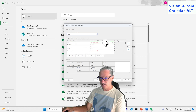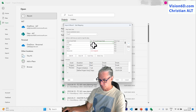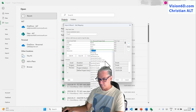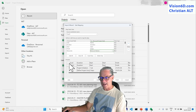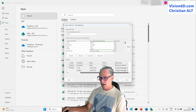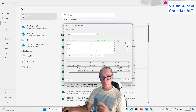In Excel it was named 'Task', and in MS Project it is entitled 'Name'. So I'm going to look for Name. To do the mapping for resources, I have something similar — I'm looking for Resource Names. Now I have the mapping defined. I can see the columns from Excel: task, duration, start, finish, and resources, and two lines showing how they are going to be converted into MS Project. With that I'm done — I can click Finish and see what happens.